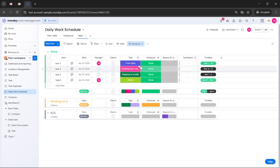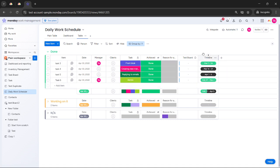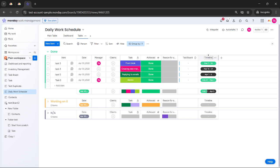For those not familiar, the timeline view provides a comprehensive calendar of your tasks and is essential for adding a milestone because each milestone will appear as a distinct point on this timeline. Additionally, ensure that your board has a timeline column. This is crucial as it's the column that allows you to manipulate task dates and visualize the project timeline effectively.